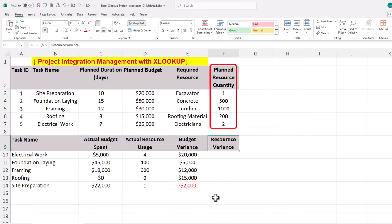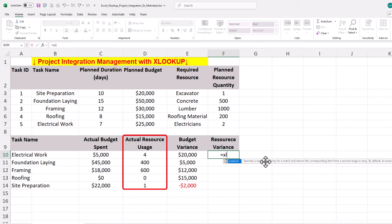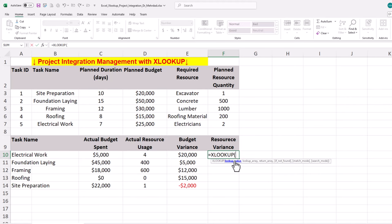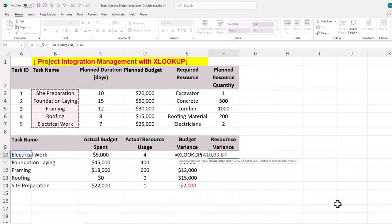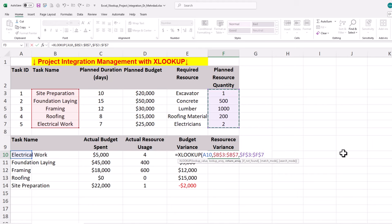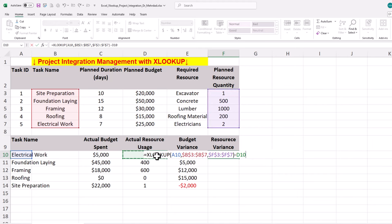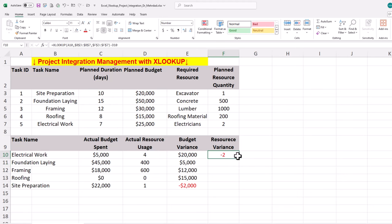Step two is analyzing project resource variances using XLOOKUP. To calculate the variance between the planned resource quantity and actual resource usage for electrical work, we use the XLOOKUP function. First, we specify to look up for the electrical work. Second, we determine to look into the array of task names. Third, we define the range to return, which is the planned resource array. Finally, we deduct actual resource usage to find the resource variance for electrical works. We can duplicate the formula for other project activities — foundation or slab, framing, roofing, and site preparation.